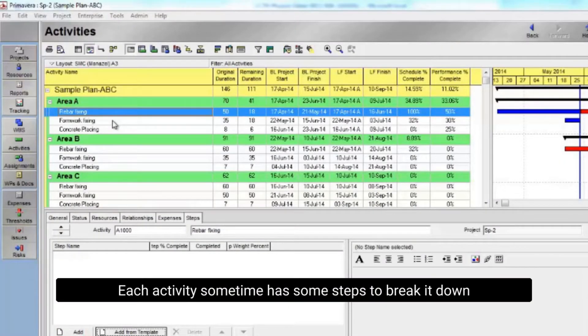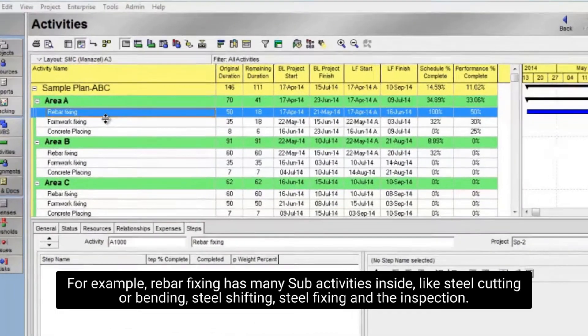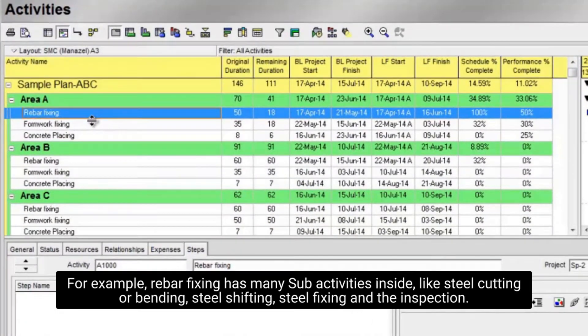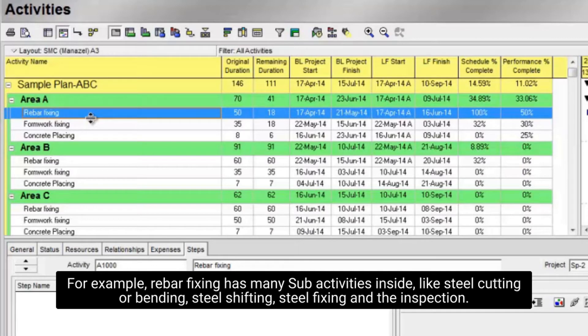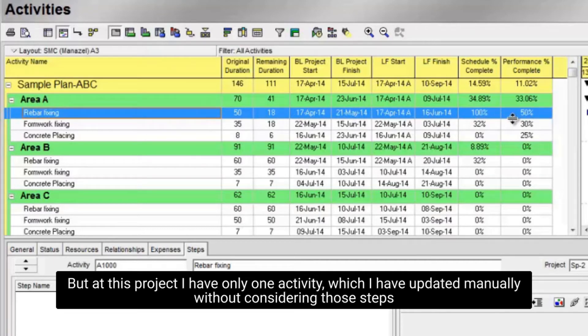Each activity sometimes has some steps to break it down. For example, rebar fixing has many sub-activities inside, like steel cutting or bending, steel shifting, steel fixing, and the inspection. But in this project I have only one activity, which I have updated manually without considering those steps.